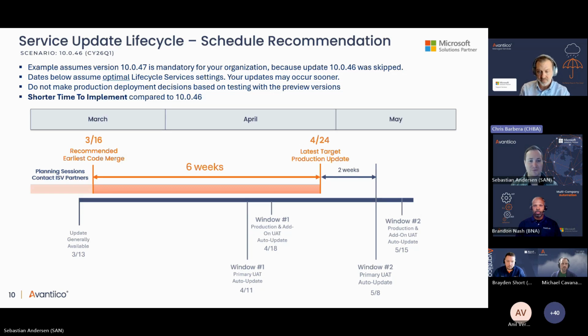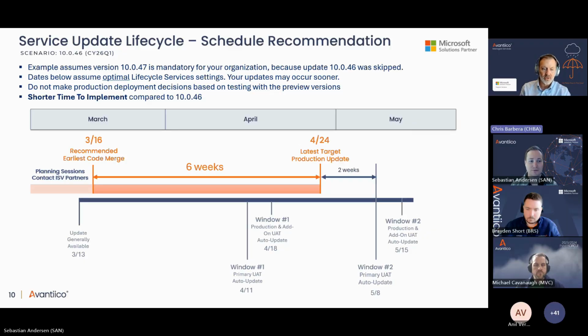Just from experience, if you go back a couple years when there was this CrowdStrike issue, it took down a bunch of systems. It did not take down D365, but most of the companies we were working with that were planning to go to production that weekend for D365 had a lot of other things going on. Other systems had gone down and they just couldn't do it. This 2-week gap gives you time as contingency to recover and still get it in without bumping right up against that service update, auto update. Okay, and that's why we recommend that. Okay, next slide.